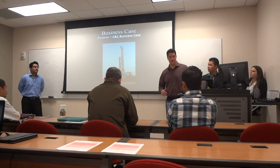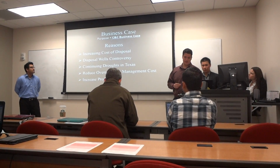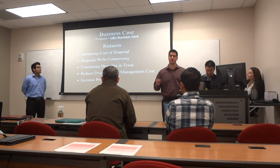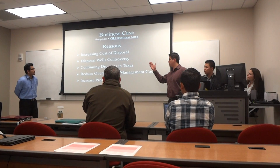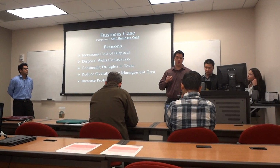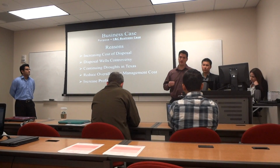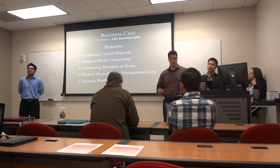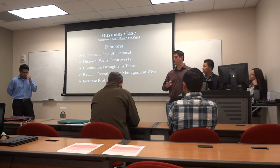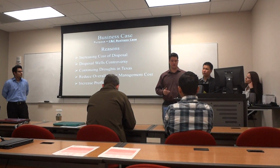Now I'm going to present our business case for treating and reusing flowback in the Barnett Shale gas fields. Within our business case, we identified several reasons why treating and reusing flowback is something that Command & Conquer needs to look into. Some of these reasons are listed here. In the past, disposing of flowback offered the cheapest option due to the large number of disposal wells in Texas. However, recent public, regulatory, and economic pressures are decreasing the availability of injection wells and increasing the cost of disposal. Also, recent water shortages in Texas have increased the price of fresh water.